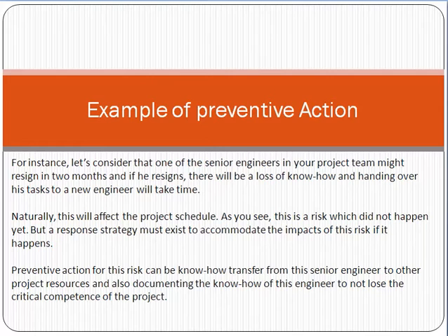This is very important, so that when the senior resource resigns, you have a backup resource who can take the project ahead. This is called proactive thinking. What is the difference here? Try to understand why it is proactive thinking. Right now the senior resource has not resigned yet, but as a project manager you recognize that he will be resigning. So as a proactive approach, you make a project resource backup of that senior resource. So whenever he resigns, you have a backup resource, and there will be no issue in the project.